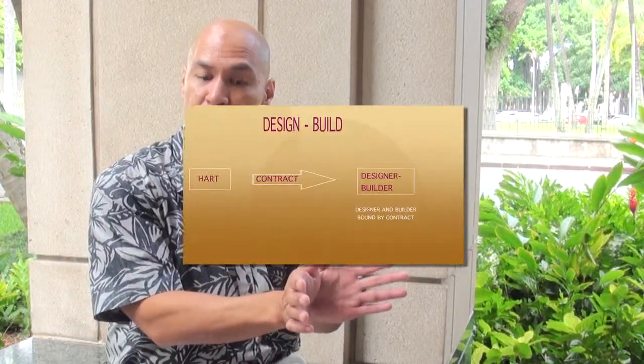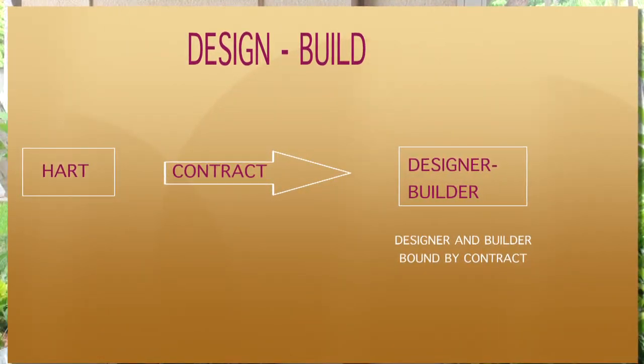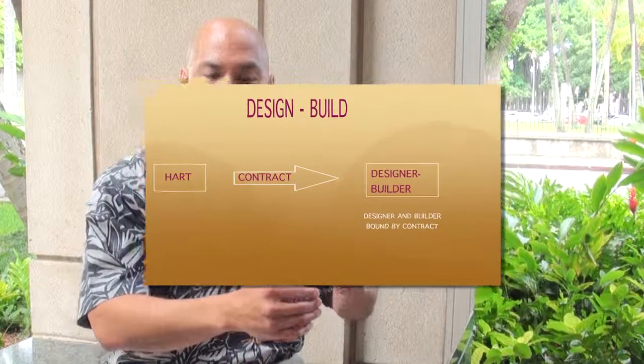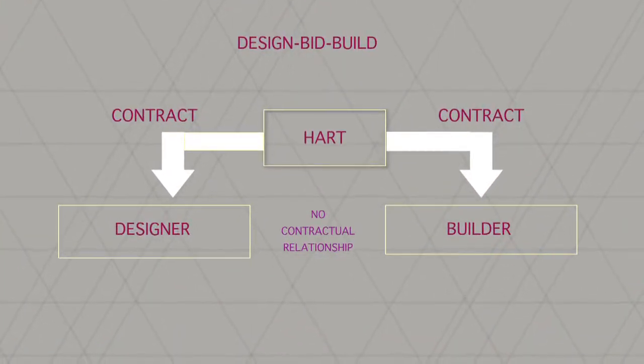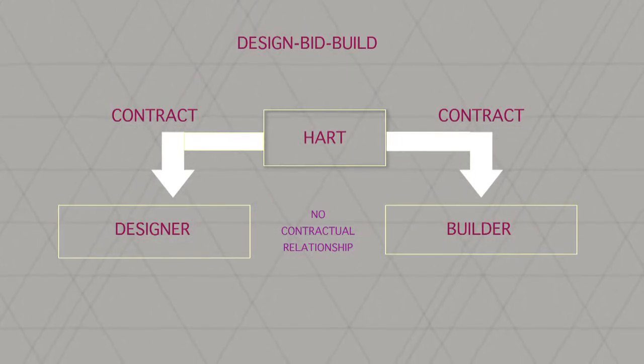Once we get to that level, then we will look at executing the work. Whether we went to a design build procurement level, where we could simply take those preliminary engineering drawings and put them out to a design builder, which we have on 3 contracts, or other contracts where we've elected to complete it through a more traditional design bid build. So we then look to procure and select a qualified design consultant, and they would complete the design. Once they're through that phase, we would put it out for bid to contractors. They would then bid, and then we'd hire that contractor, and then they would construct.